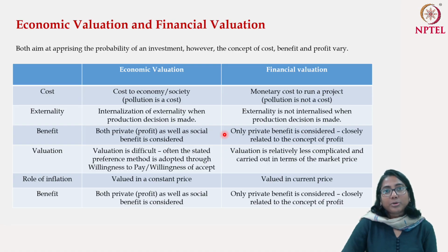The investment will be accounted for in the financial valuation. However, the positive externality that will be created through the increase in employment will not be accounted for in financial valuation, but that will be accounted for in case of economic valuation. Now, understanding of these two different types of benefit becomes very important when we go into the discussion about the renewable and non-renewable. This can also be explained in terms of cost and externality.